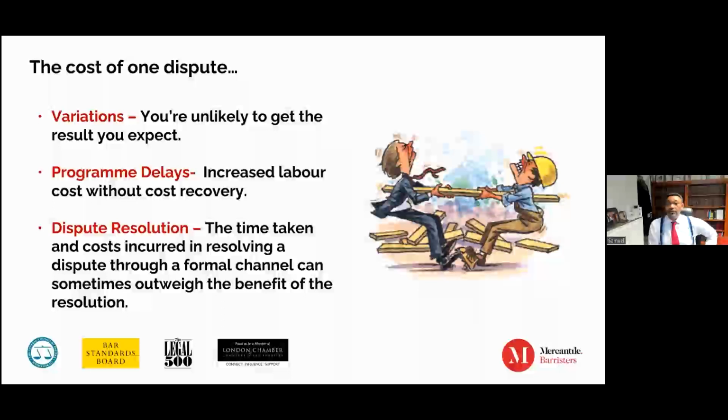So if your variations have arisen now, and you have not announced them now, you have not quantified them now, you've decided to leave them to the end of the project, you can be as certain as you will be that you won't get what you're entitled to in that regard. Now, your program delays, you will also find that you probably would have incurred additional increased cost of labor without recovery. And in fact, it isn't all increased cost of labor that you'll be entitled to recover.